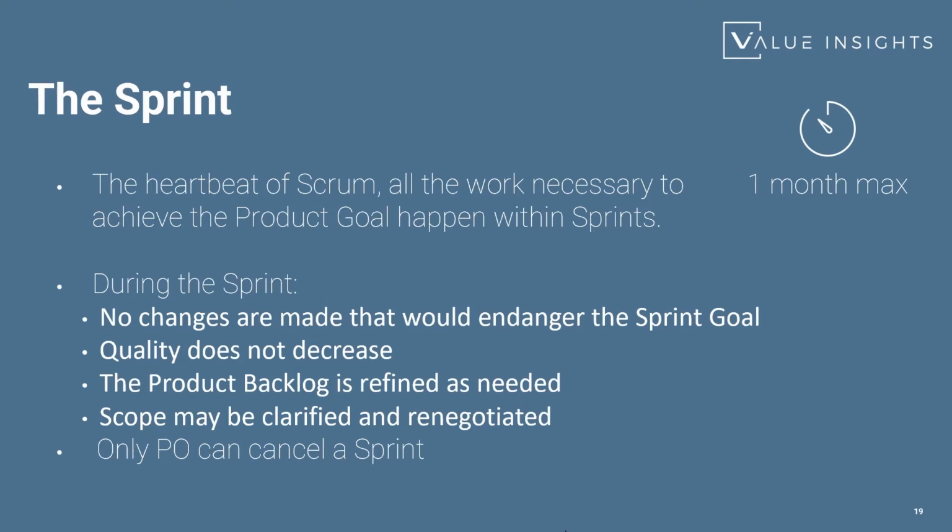Important to note that there is only one person who can cancel a sprint, or only one accountability who can decide to cancel a sprint if the sprint is not valid anymore, and this is the product owner.